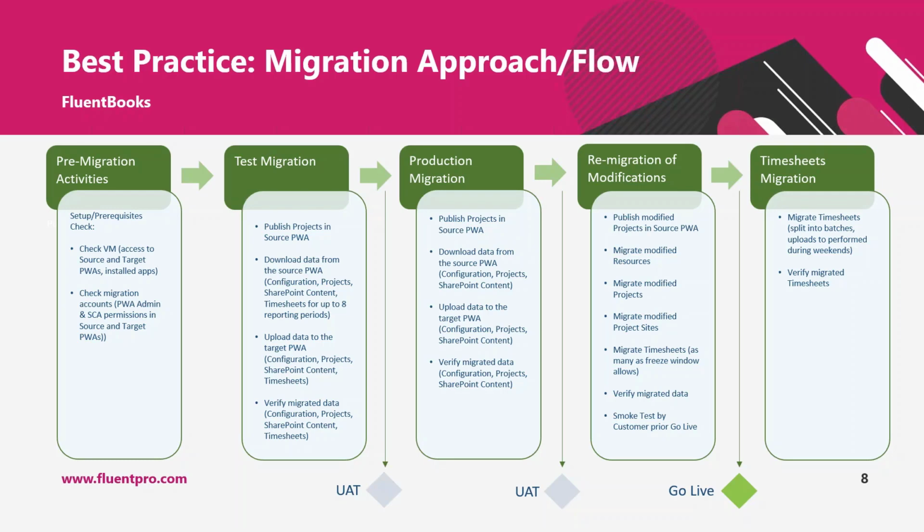So for example, if you do visual checks after migration, comparing your project center in the source and project center in the target, like for example, you are comparing project level fields. If in the source your draft and published version is different, so project, for example, was not published for a certain time, you will see so-called false positive differences.